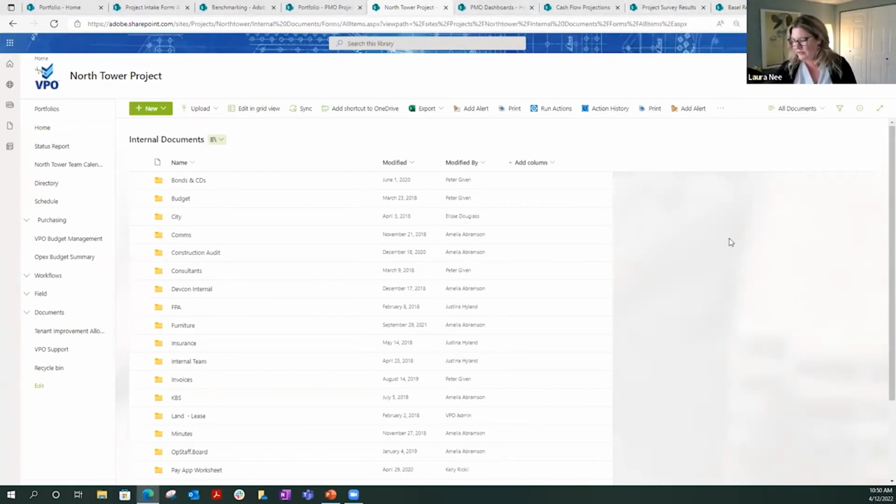Has there ever been a time when there was a dispute or when you were able to refer back to VPO records to resolve it? Oh, yeah. Good example, we did a project in Seattle, and we had a problem with the flooring that was specified by the architect. And so again, going back to the fact that we have all the documents, the RFIs, the submittals, we have all the contract documents, everything in one place that we could easily reference and that our legal counsel can reference. It made it so much easier. If we had been in that same situation where we had to figure out who had what document on their hard drive, that would have taken a lot longer to get resolved.